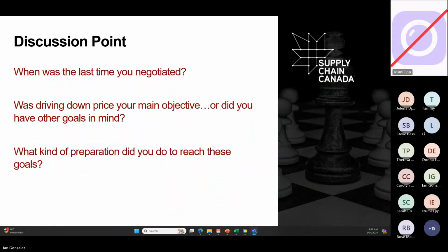Donna, you said something also a while ago. What was that? Well, we've seen lots of issues with lead times for projects at this point. So we looked at suppliers and reached out to them for both pricing and follow-up, and made sure that we had all their internal orders as soon as we produced a purchase order for them. Just because if we leave it to them, then we were falling behind. Yeah, so you were thinking also, aside from the commercial agreement, you were considering very heavily the business requirements, these lead times, right? Exactly. Yeah. Thank you. Thank you for sharing.